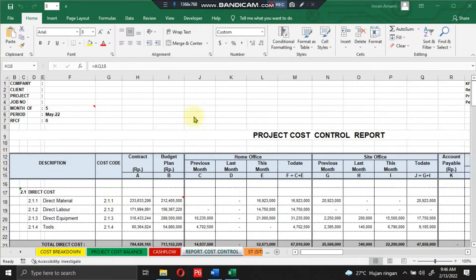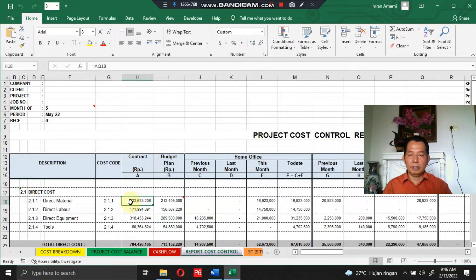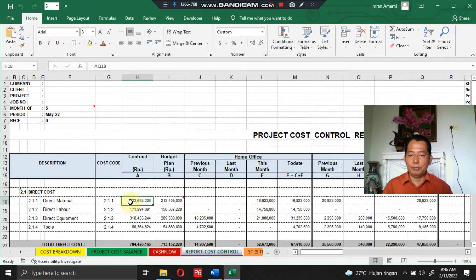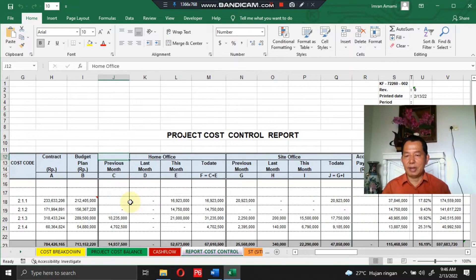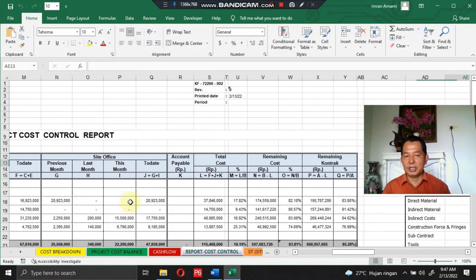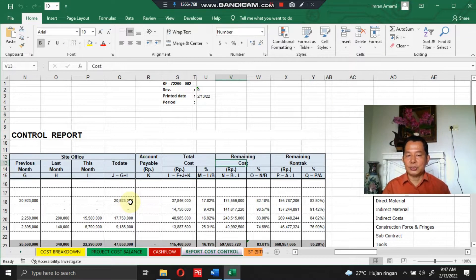In the cost control report section you will see the project contract and the budget plan. You should input both of them manually, but I have made a link for this data already. Costs incurred during the project are divided into two sections: home office and side office, each divided into previous month, last month, this month, and today. On the right section you will see remaining cost to the budget plan and remaining cost to contract.